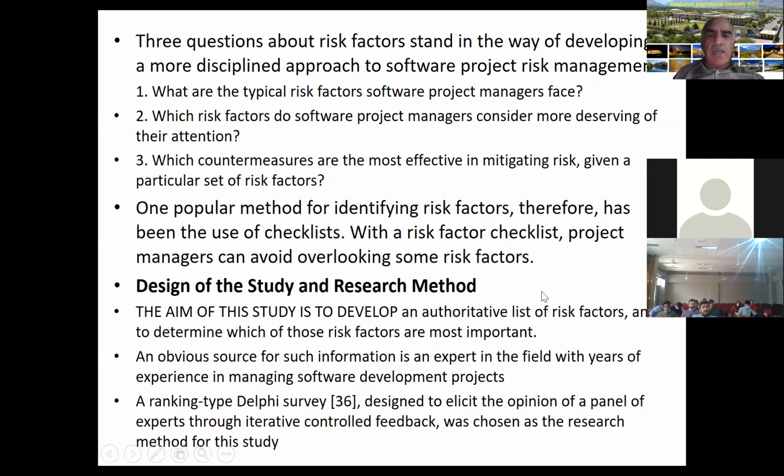Okay, so the risk factors which were involved in this study, an obvious source of such information is an expert in the field with years of experience. So one way, and we will discuss this method, which is now called the Delphi technique, is that we bring the experts and then we discuss the issues with them. And then finally, we try to see what can be the top 10 or 5 risks involved.